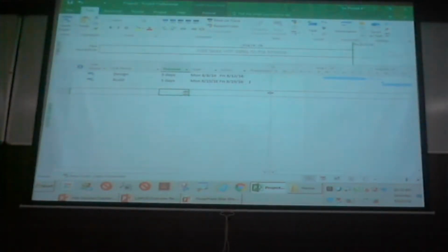Because I do see a lot of times users who are using 2007 or 2003 don't have this task mode column. So every task is auto scheduled till 2007. But when their organization moves to 2010 or 2013, they see some columns which they don't understand. So the moment they see that, they hide it. And that's where everything got started. So make sure that you change your task mode if you are using 2010 or later versions. That's the first takeaway I would like to give you.